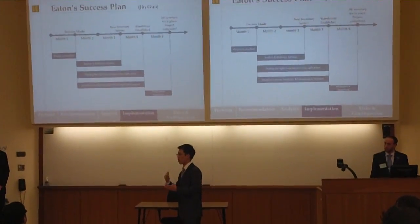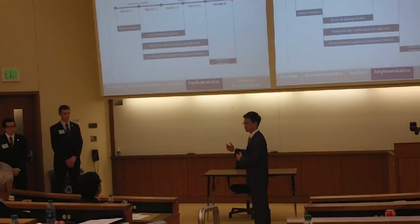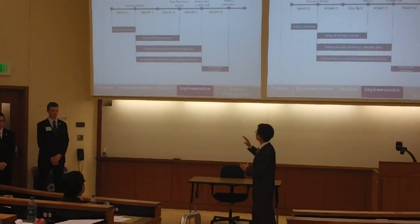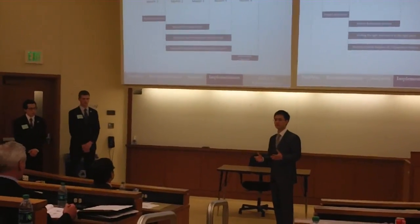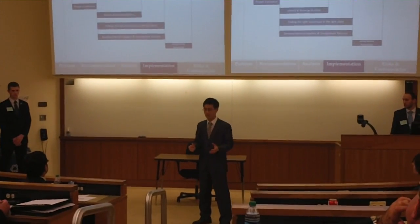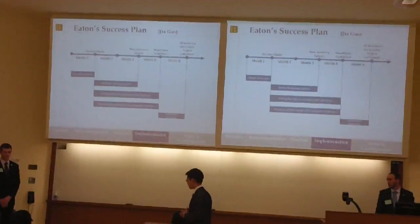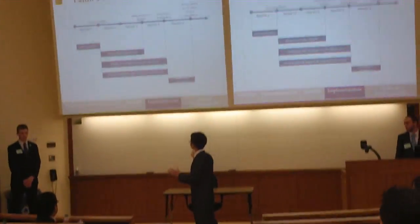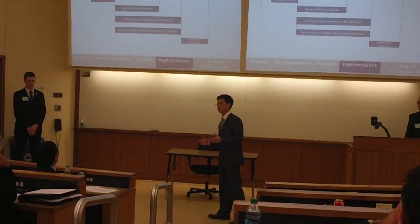we can have a warehouse established, and a strong relationship with our suppliers and consignment partners. Following on, we can start deploying the inventories to the designated sites. This is going to take a month. We believe that this whole process can be finished within 6 months, providing we have all the resources.